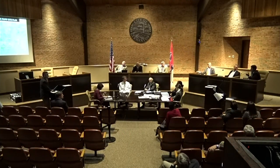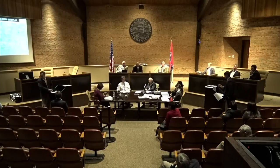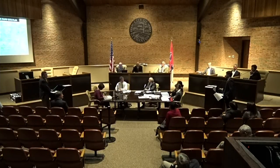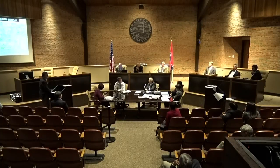My question is more for the public, and maybe this is for Mr. Ross or someone. The timeline on the road going in there, Forest Hill, I know that's a concern to a lot of citizens. If someone could elaborate on that. I'm going to ask Mr. Gwaltney. He is a city engineer and is the chief project manager for the Forest Hill Irene project to talk about that. Sure. The project is currently under design. Funded this fiscal year is the right-of-way acquisition. The construction is funded in FY19.